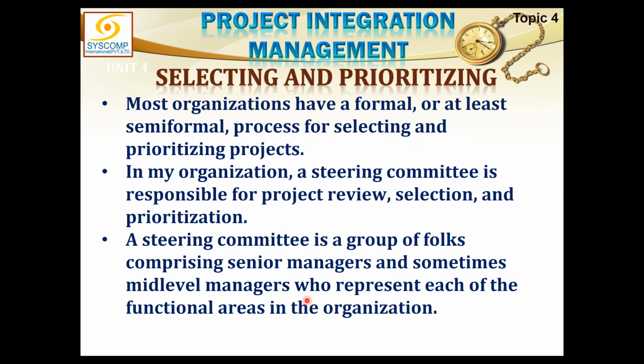A steering committee might be responsible for project review, selection, and prioritization. Maybe there is altogether a committee, a project steering committee sitting up there who would decide which project to be started and which not to be started. A steering committee is a group of folks comprising senior managers and sometimes mid-level managers who represent each of the functional areas in the organization. So representation of all various functions or operations or departments should be there in the steering committee, so that the interest of all could be properly catered to and considered.